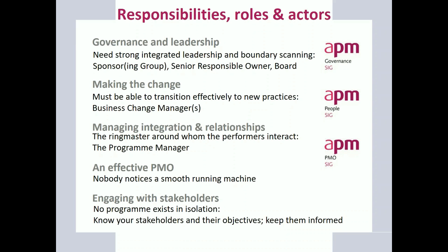The intent here was to ensure the integrity of the data for the board and to ensure that the program manager couldn't get at the PMO and doctor the results that he thought ought to be presented to the board, rather than the results the chief operating officer felt the board needed to know.